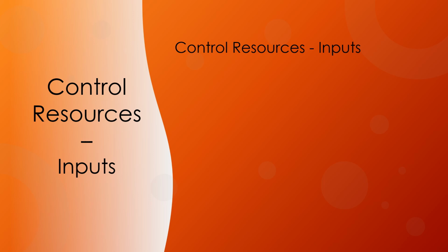Control resources is concerned with monitoring resource expenditures, identifying and dealing with resource shortage or surplus in a timely manner, ensuring that resources are used and released according to the plan and project needs, informing appropriate stakeholders if any issues arise with relevant resources, influencing the factors that can create resource utilization change, and managing the actual changes as they occur. Any changes needed to the schedule or cost baselines can be approved only through the Perform Integrated Change Control process.